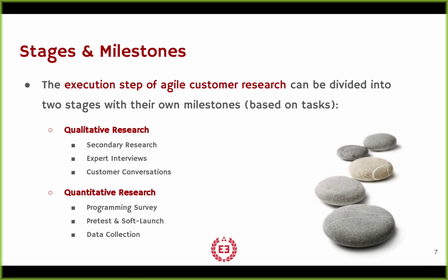This step itself can be divided into 2 stages that have their own milestones, and milestones should be something that group tasks. Not utilizing milestones creates an environment where all the tasks seem very disconnected. It's hard to understand how they're supposed to fit together, what kind of momentum you're supposed to get from them. So it's important to utilize that in-between piece, which is the milestones.